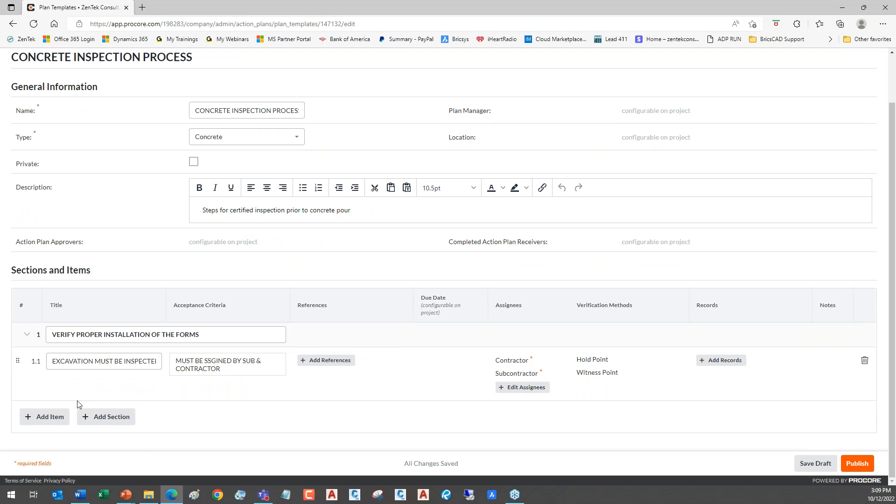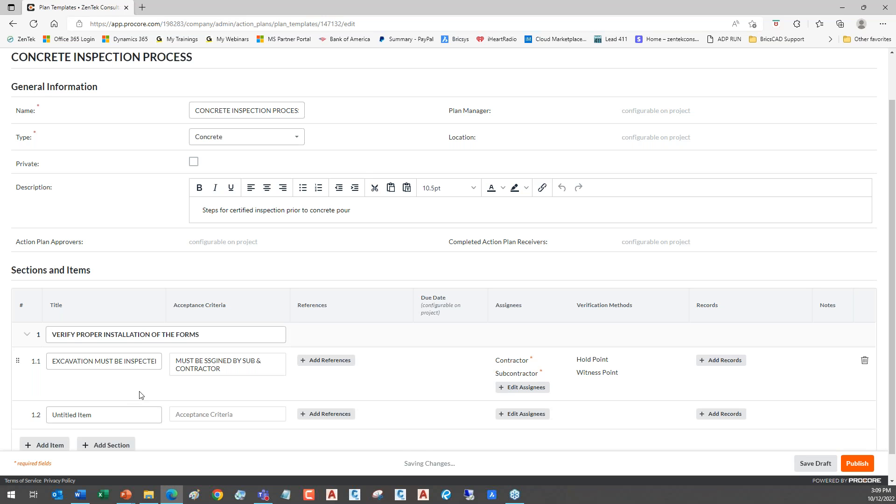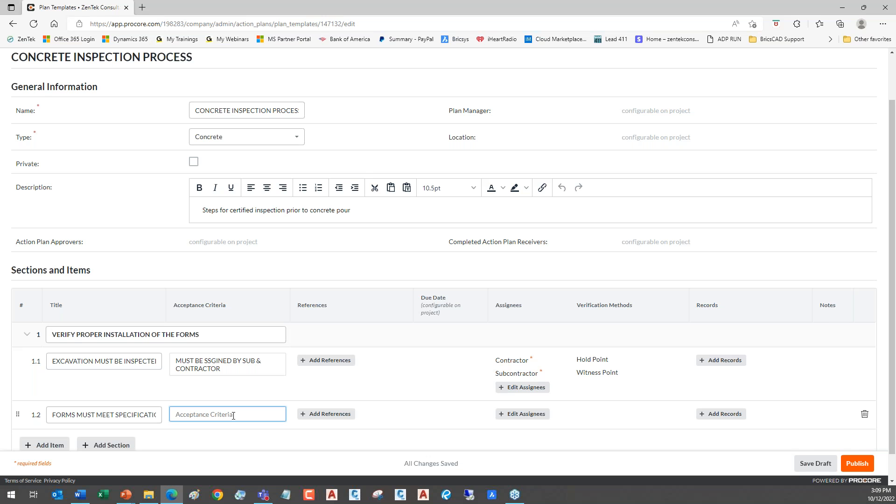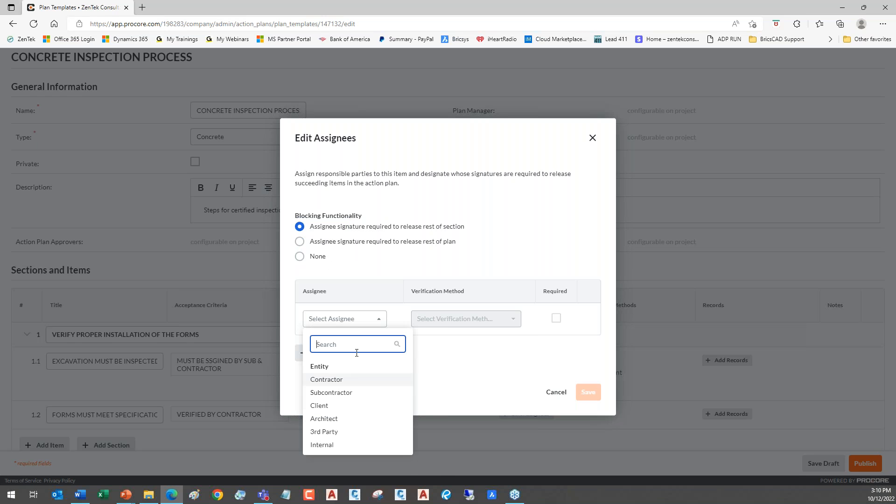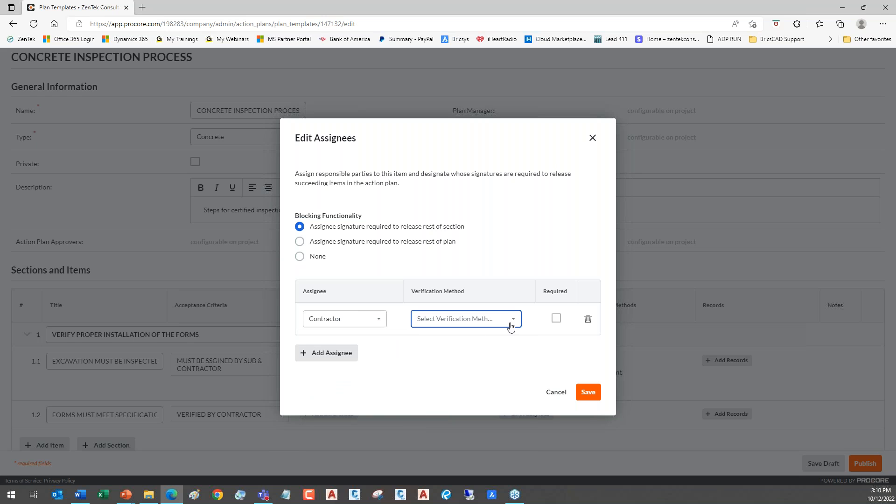And here's where I can go in and start adding the people who have to approve this process in order to move it forward. And the great thing is that the people who sign off on this, who approve these steps, Procore is going to lock that in and keep track of it. It provides accountability for every step of whatever process you guys are putting in place. I can go in and say assignee signatures are required before they can go to the next section. So I can do it at each section, or I can just do the overall plan. I'm going to start selecting assignees. So who's got to sign off? Well, I said the subcontractor. And what does he have to do? Is this a hold point for approval?